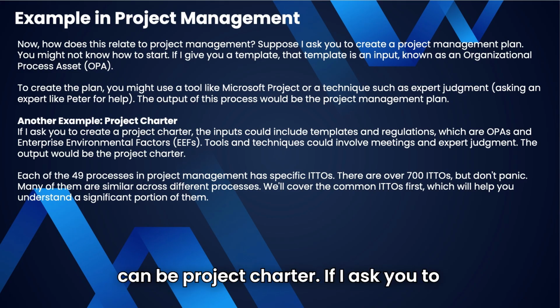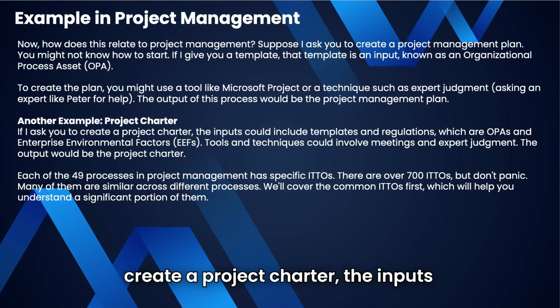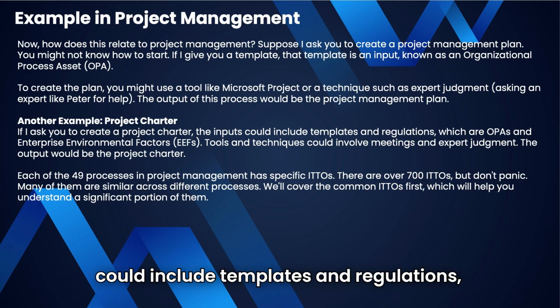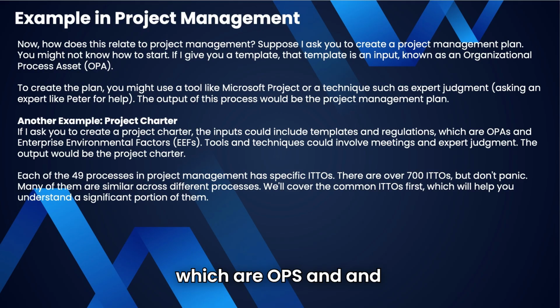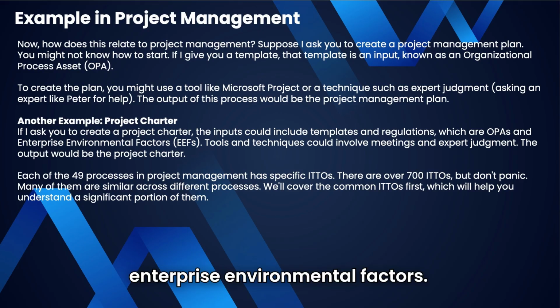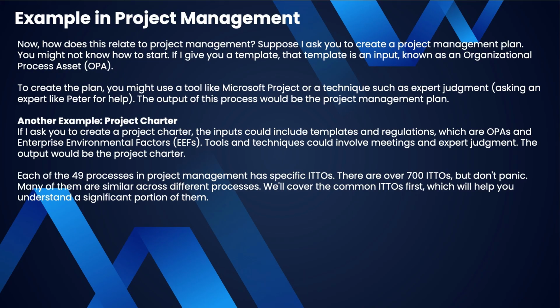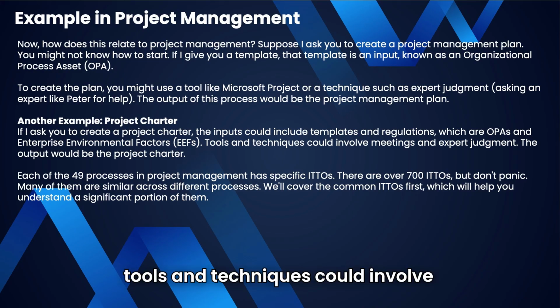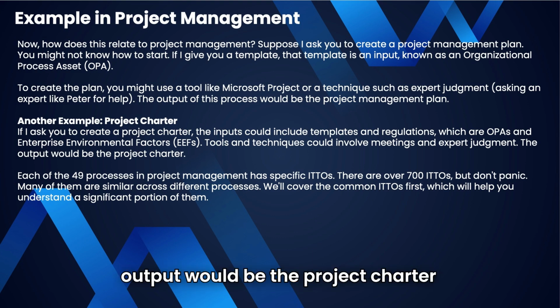Another example can be the project charter. If I ask you to create a project charter, the inputs could include templates and regulations, which are OPAs and Enterprise Environmental Factors (EEFs). Tools and techniques could involve meetings and expert judgment. The output would be the project charter.